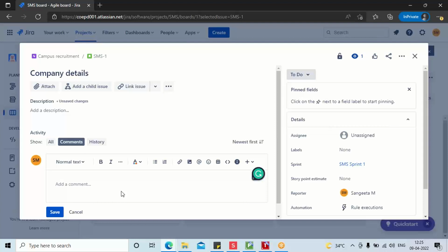But if I have completed all my sprints, and it is almost 1 week to deployment, I might not be able to accept changes because the developers have frozen their code. Then I can talk to the client. Yes, ma'am, that was my main question: once all the sprints are done and the change request comes, all the requirements have been signed off and next week you're going to release your project, you can't add a change because a dependency will be created again. But in the initial stages, changes are still happily accepted in Scrum.